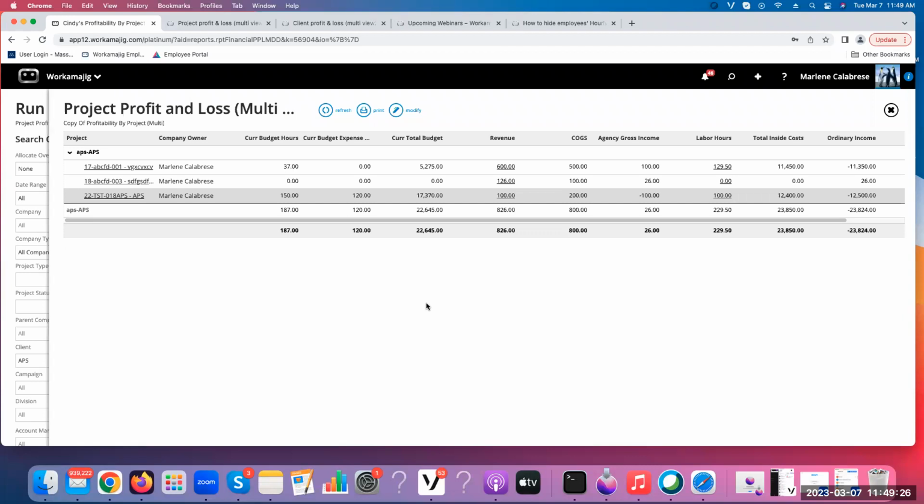well, if they're the creative, or they're the other copywriter running it, and the amount is any amount higher than what they know they make, I mean, there's just a lot of things to consider there. But you are totally right that you could use a blended. A lot of people do, in fact, use a blended, just because they're looking for a roundabout figure there. They're not looking for down to the penny, because again, we're using a 2,080-hour work year. We're not using the exact number of hours they worked that year, that kind of thing. So that's a great suggestion, Melody.